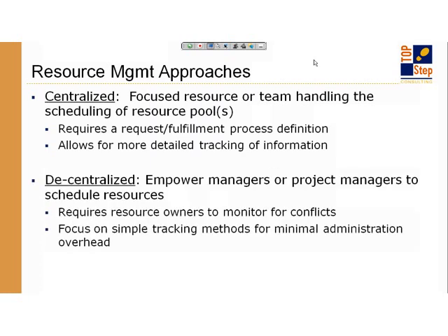The decentralized process is more of a push down, empowering people down doing more activities outside of resource management to do resource management. This is, in my view, and I'm not the ultimate purveyor of resource management procedures, but what I've seen worked effectively, more of a, I'm going to go and grab people based on the fact that I know they're open and available, so there's no middleman, so you can get more real-time response for resource scheduling.